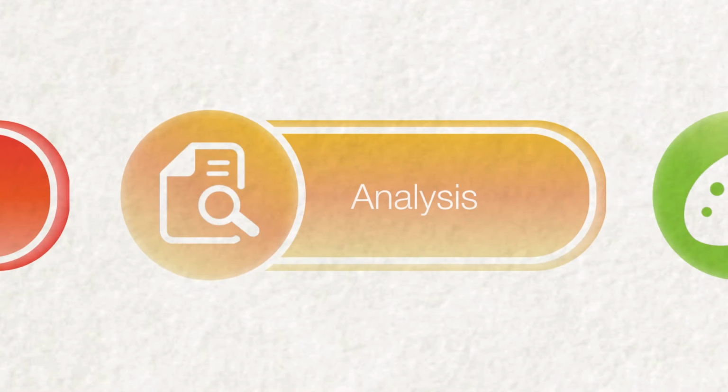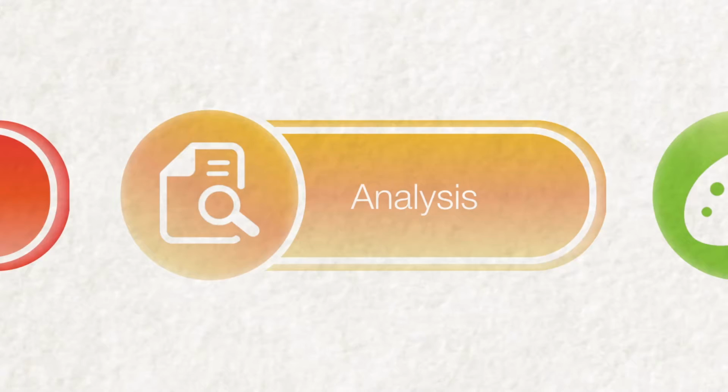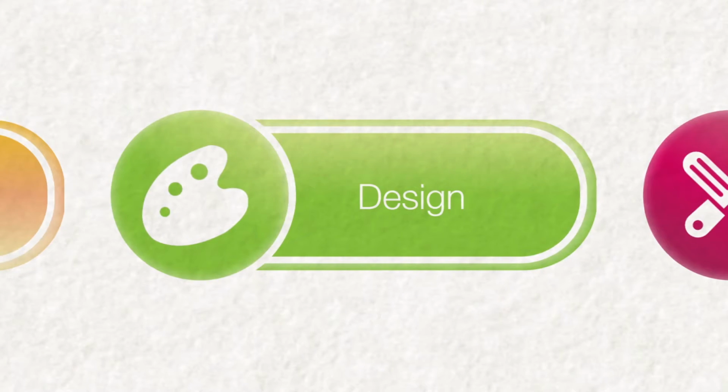The second phase of a project is the analysis phase. This is where the project really gets going. Implementation is started. Again, with the input of the customer and their key stakeholders, we'll determine and finalize a project charter, project plan, and scope, and we'll conclude with a kickoff meeting. This is where all interested parties will be involved and understand what the scope and timeline of the project is.